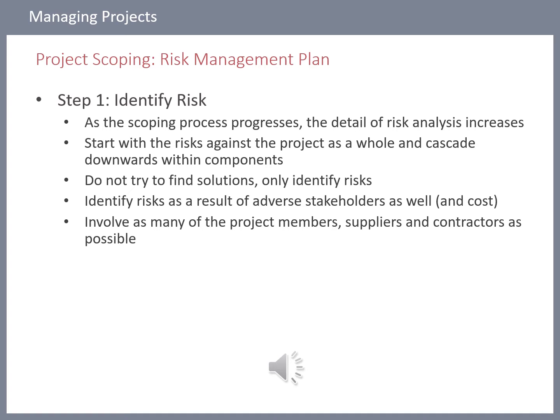So it's very important here that you take a very broad approach and try to get a list of risks as big as possible, so that you can go through the analysis process and then say, well, this is not really a risk, it's too low, or it's not applicable to us, rather than miss a risk which is applicable to the project.